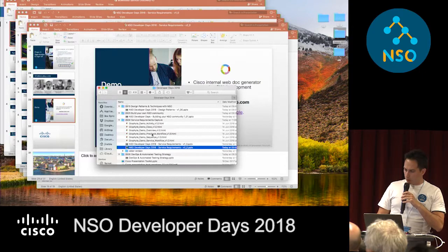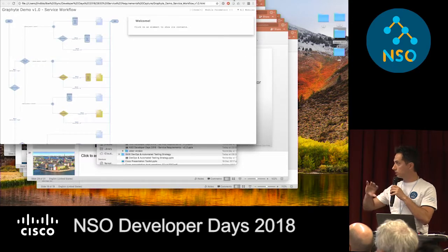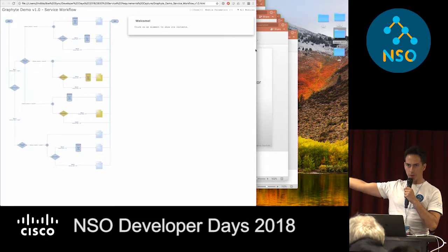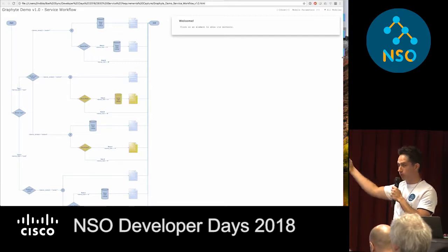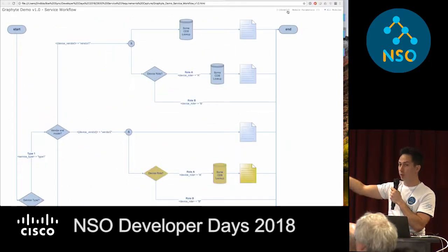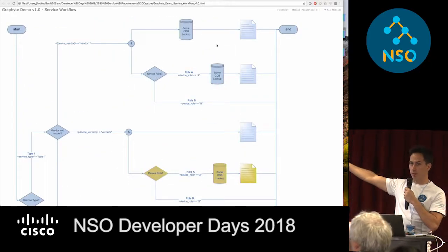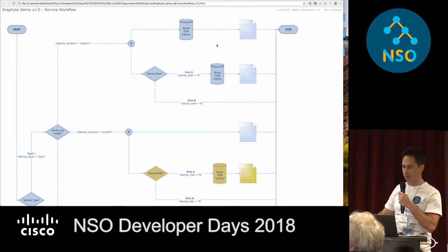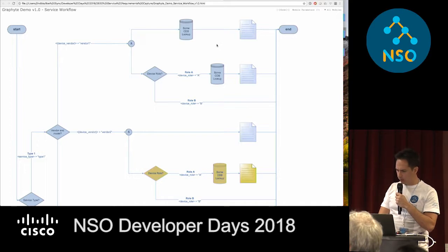We use this as a reference for the whole development cycle. This is where we sign off requirements, what we use as a reference for development, and what we use as a reference for later QA and testing, right? So what is here is what is going to be done. What is not here doesn't exist.